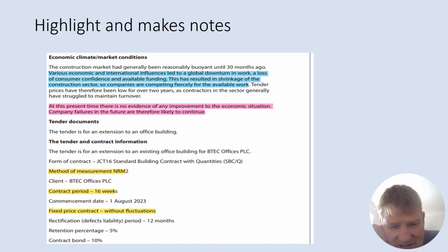Okay, the problem that you've got is a 16-week contract. That's not too bad, but it means fast track construction maybe, because 16 weeks is only 4 months, 5 months at most, and you've got very high liquidated and ascertained damages, which I think are £85,000. So if the contract is 16 weeks and it takes you 20 weeks, another month to do it, then you'll be charged 4 weeks at £85,000.